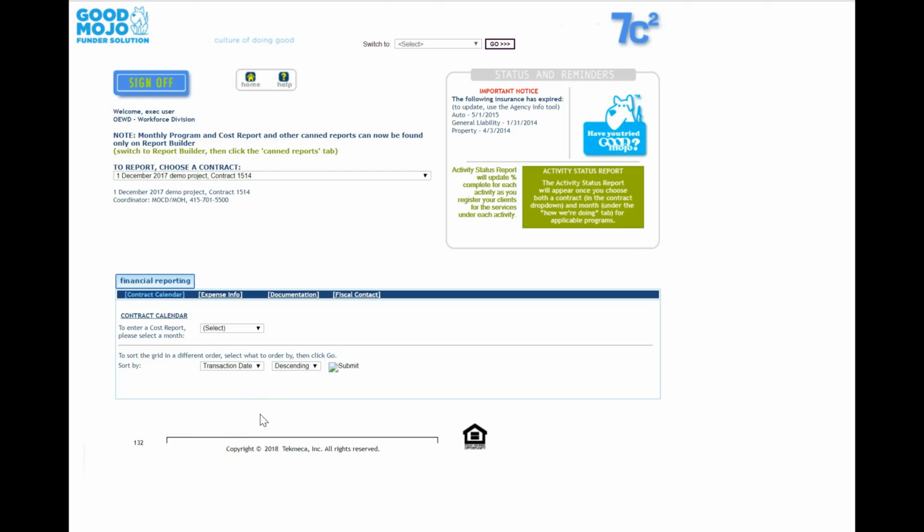To ensure that reporting is up to date, your agency should submit a monthly invoice through TGS by the invoicing deadline to report all charges for which you want to be reimbursed from the prior month. Generally, these invoicing deadlines are the 10th of the month for Workforce Development Division grantees and the 15th of the month for all other OEWD grantees.